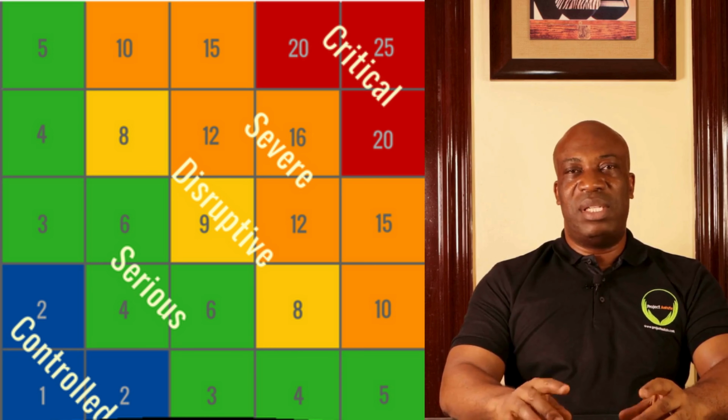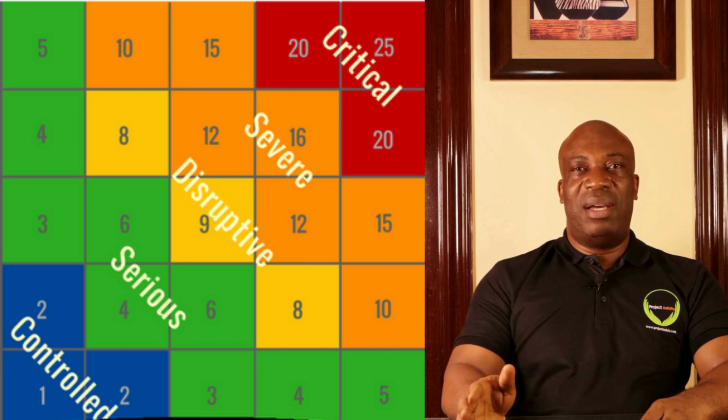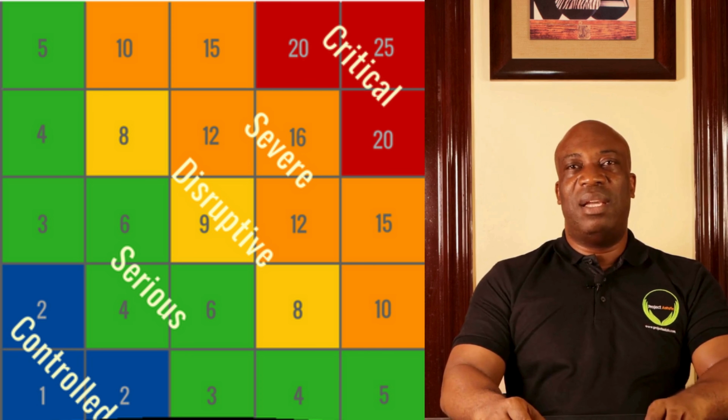The main purpose of using this PI grid is to be able to plot your categories within this PI grid. I've been in projects where the project board will always tell you that when a risk moves from one category to the other, within these boxes, you can see the one which is demarcated in blue. The upper right corner is high risk, and the lower left corner is low risk. The main purpose of this is, as you run the project from the beginning all the way to the end, the risks are going to be moving from one bucket to the other, depending on the situation.